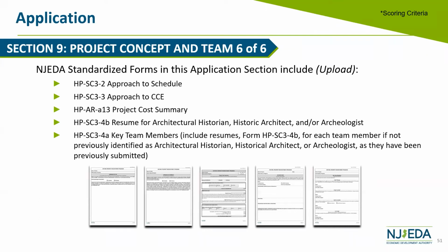Why are you asking for full construction level drawings when one of the requirements of the program is whether the project is feasible without the credit? If it's unclear whether the project can move forward, it's unlikely that the owner will want to finance full construction level documents. Design development or a later schematic level is more appropriate. So this is something that we struggle with.